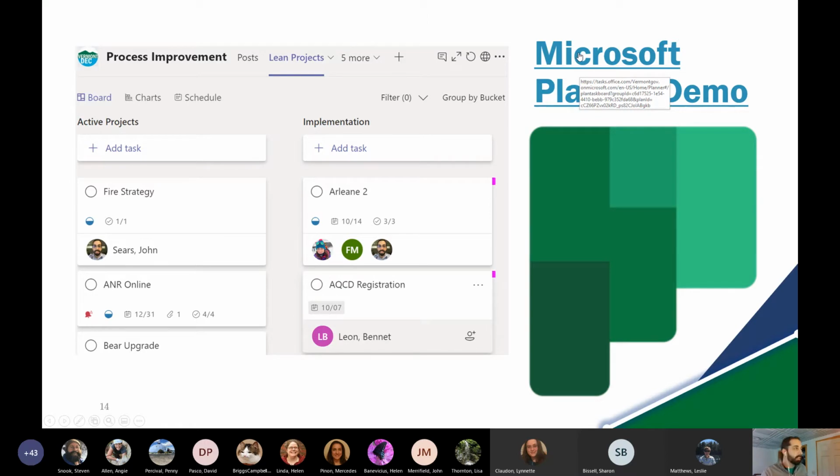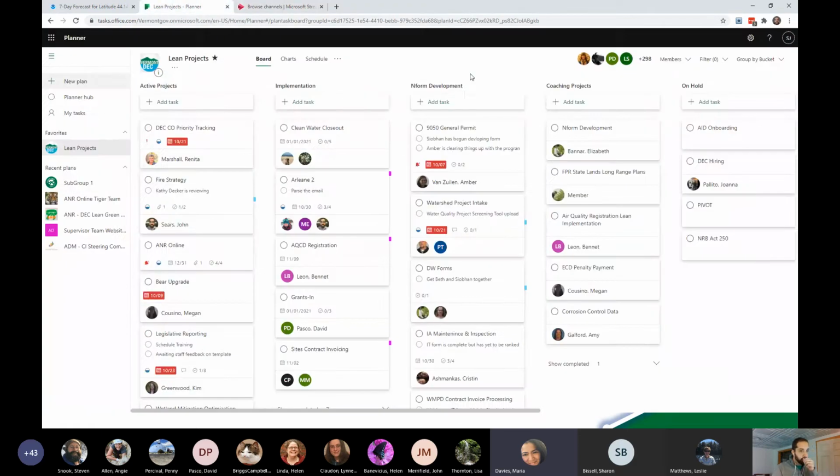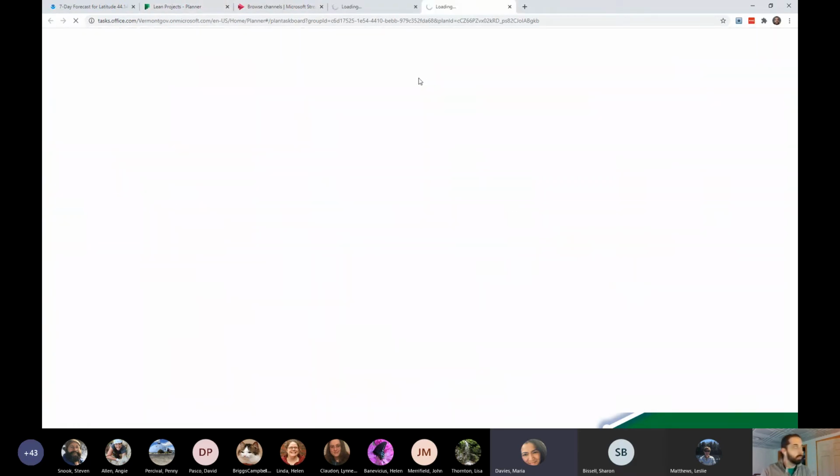Maria. Hey, I was taking a couple of high-level notes here, and one of the things that did capture me was what you said: it's important to keep track of what we're doing because, especially with the Kanban board, it helps us with what's in progress, and once that limit is reached, we don't add new tasks until something falls off, and that's critical for us.